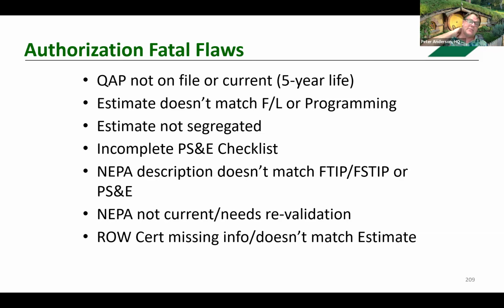It can go above that 12%. It just needs to be approved in advance. That's really what it comes down to. So the DLA should be approving a cost to go. And so the reason, like I said, I use the higher percent is to show it is possible to go above that stated percent.